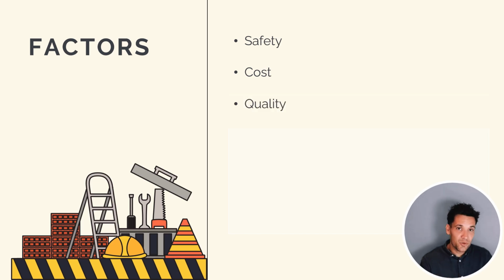Quality, again, do we have the skills and expertise, or is it a specialist trade? For example, if we're not an electrical company, we shouldn't be self-performing electrical works. We're going to end up with a whole lot of defects and quality issues. The program, what sort of time do we have? Self-performing works generally works better if you have a long time to do the work and a smooth, continuous flow of work. If you have a ton of work you need to do in a short period of time and it stops and starts, you're better off subcontracting.